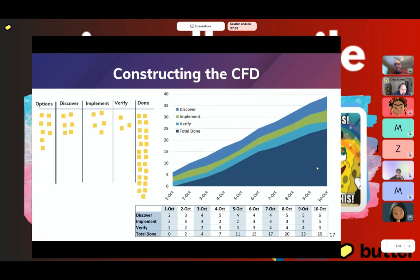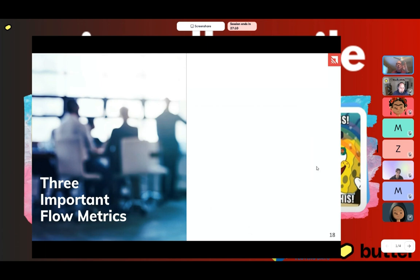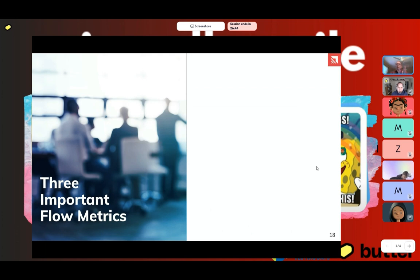The total done is cumulative — it adds up over time — but those other statuses are the measurement of that snapshot time, right? That's exactly right. The snapshot is being taken every single day in my examples, and I think that's realistic. It doesn't have to be every day; you can do it every week. It's good to know, when working with a new team, when they're taking their snapshot, because the x-axis may be labeled every week even if snapshots are taken daily.